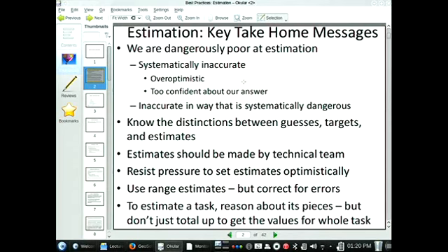They can also avoid the situation where you're pilloried, you're pegged for having missed this single point estimate. Instead, you're trying to fall within this range. So they're very, very attractive ways of estimating things. And in my own professional consulting work, I've used those to very good effect. And I'll tell you that it helps the team that's employed me much better plan about how long things would take compared to the mean estimate that I would have given. And it helps me reflect the risks, the unknown risks, or the risks associated with unknowns that need to